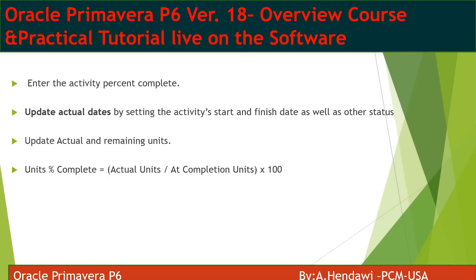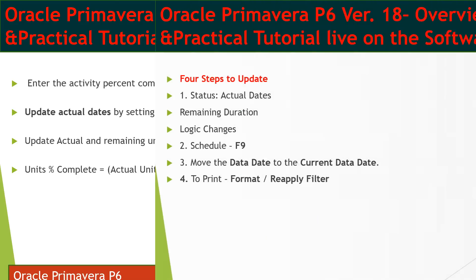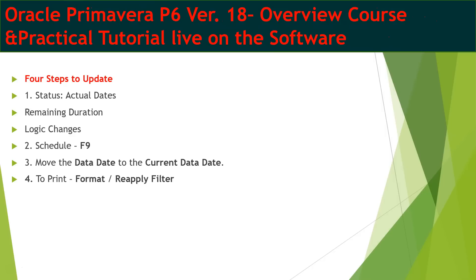You have to go and enter the percent complete for each activity, entering actual dates and remaining durations. The units percentage is calculated as actual units divided by at-completion units multiplied by 100. For example, if you have actual units of 20 divided by overall units of 100, your progress percentage for this activity is 20%. Once you have all the information, you go to P6, start actualizing the dates, add the remaining durations, do any logic adjustments, and press F9, which allows you to schedule the dates and run the calculations.